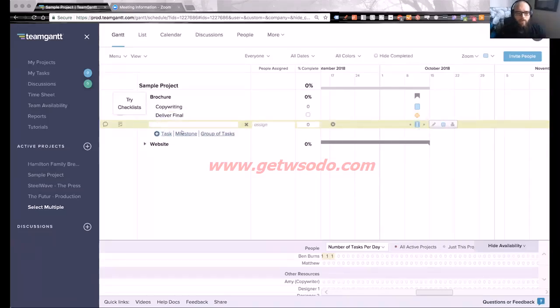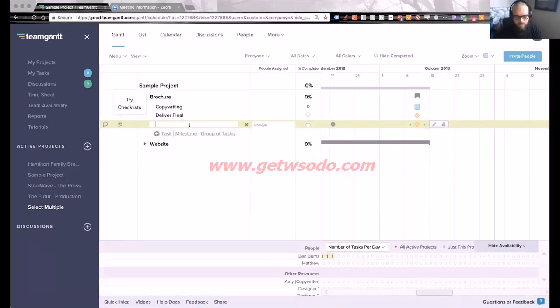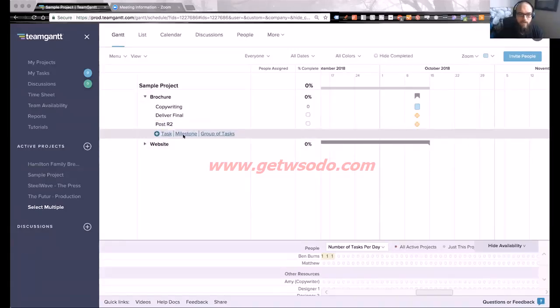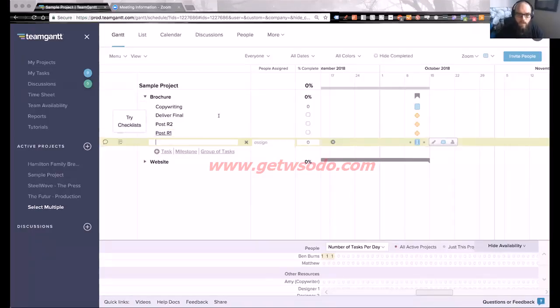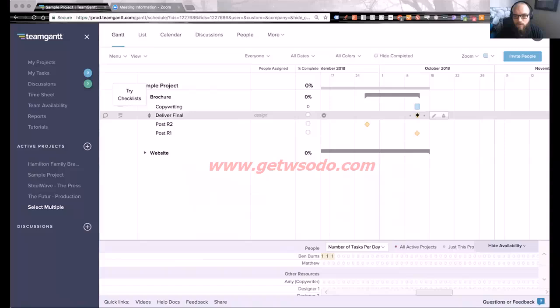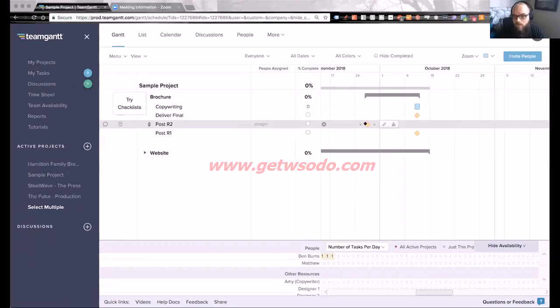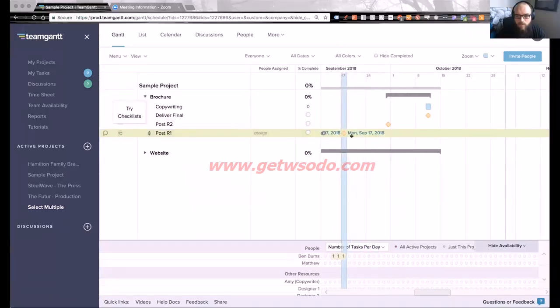So from there, I want to work backwards. Obviously there's going to be some rounds of revisions. So I'm going to create a new milestone for deliver post round 2. Let's say we only have 2 rounds of revisions in our SOW, post round 1. And so what I'm going to do is take the milestones that I've listed here and move them around. So we know that if we're doing the final, we probably only need a week between milestones, and we'll just position them accordingly. Maybe we'll give this one a little bit more time.